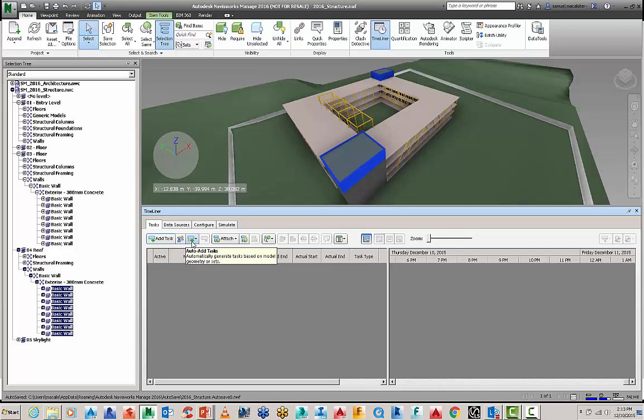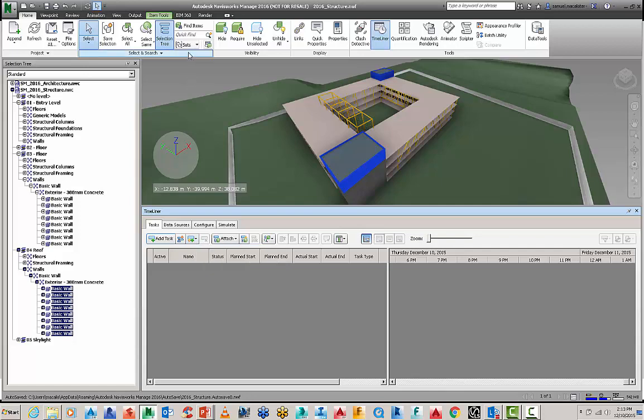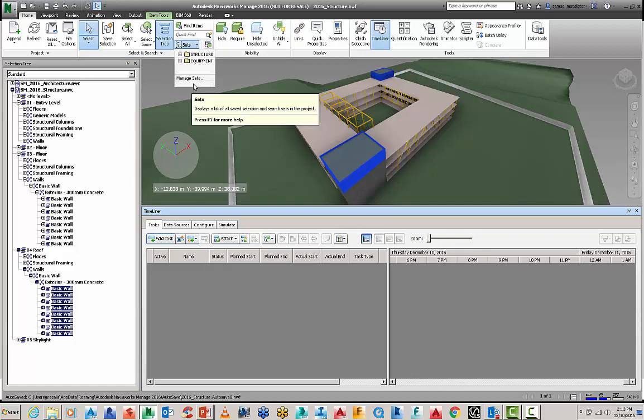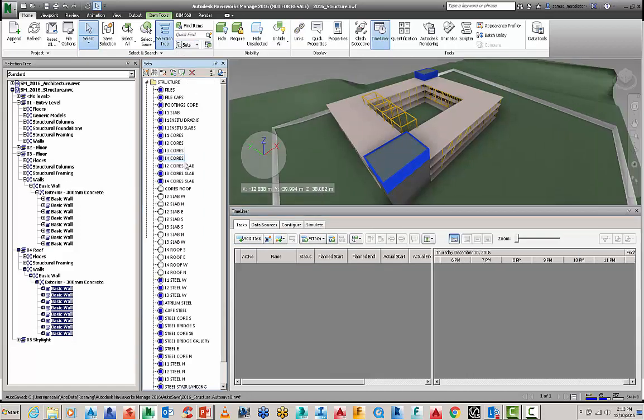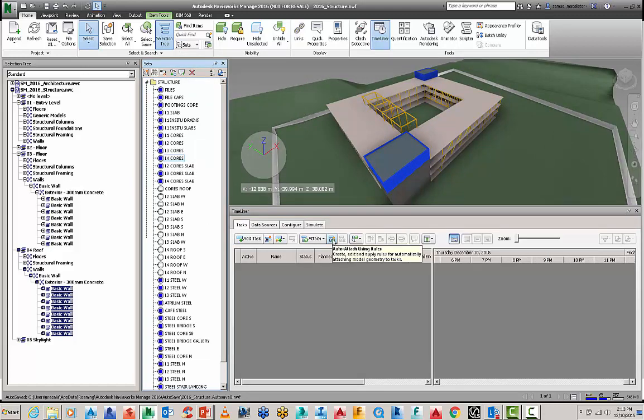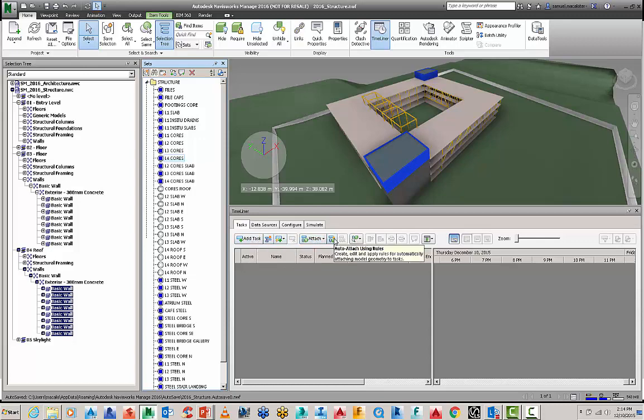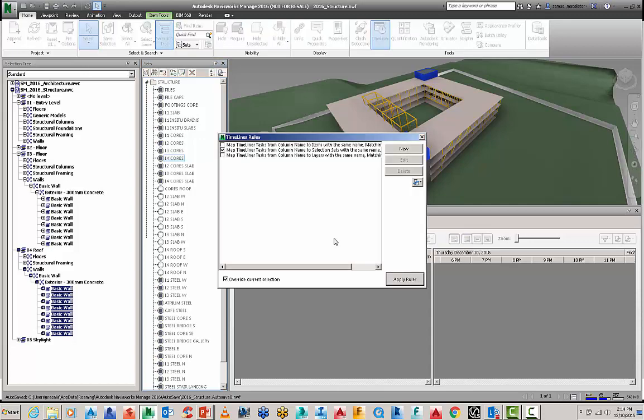We're going to use the automatically generate tasks based on the model or geometry sets. As I mentioned before I've actually got some sets here, it's going to auto attach via the sets and there's a setting over here you can actually manually attach items to the task so you're doing your tasks then you're going to attach or we can set up some rules.